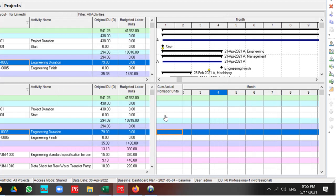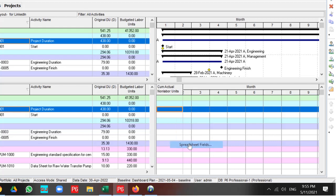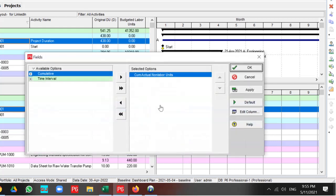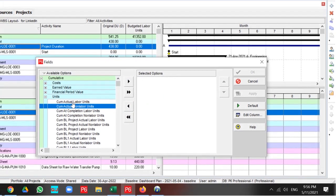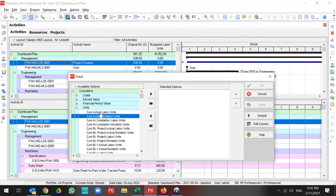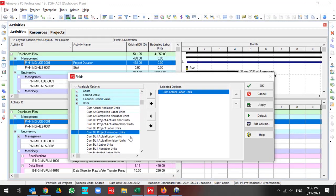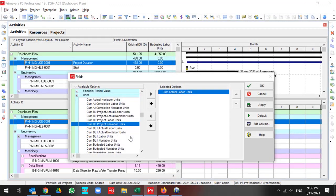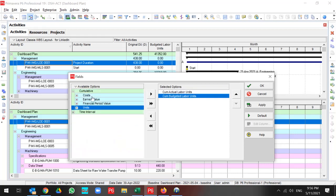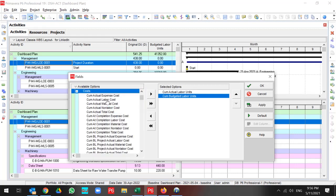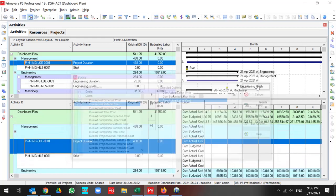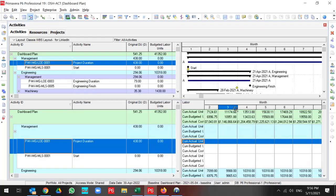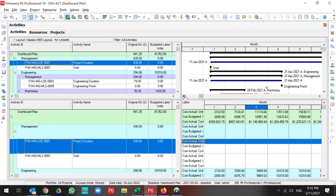For better understanding of Activity Usage Spreadsheet, let me gather the information for this project. For instance, I insert Cumulative Actual Labor Unit, Cumulative Budgeted Labor Unit, and add Cumulative Actual Labor Cost. This shows me a quick view of my project cost at the project level.